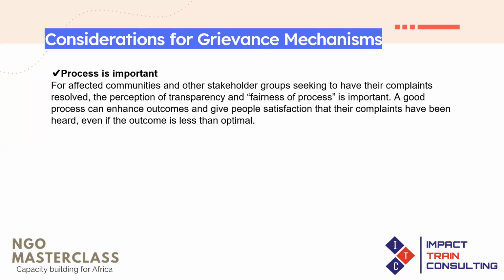Do we have the right process, whereby people who are affected can share their complaints and have those complaints resolved? So every organization needs to have a CRM, a complaint response mechanism: a process of lodging complaints, a process of reviewing those complaints, and a process of resolving those complaints.